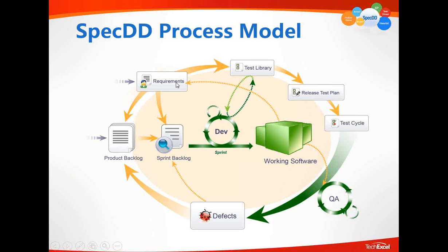people will recognize the fact the initial requirement is not complete. Such as the email announcement function I just described: as it starts to behave, you will see you forgot that as you send the email announcement, if you happen to be another team member, another product manager who opened another browser looking at the email announcement, you need to improve the requirement to reflect the fact that during this 30 minutes of data preparation time, it would be better to add a status showing it's preparing for sending.